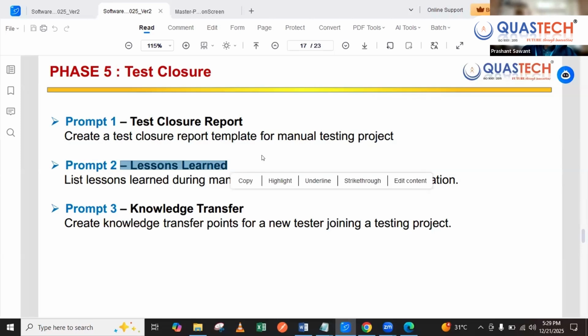Here are the industry terminologies that I am using, which are missed by many of the organizations. It's like, okay, the development is done, testing is done, we are done with our application, we are giving the deployment to our client, and our work is done, the project is closed. No, the project is not closed, actually speaking. For that particular project team, what all lessons they have learned in this particular release or deployment, the development of that entire release, that is 100% a must.